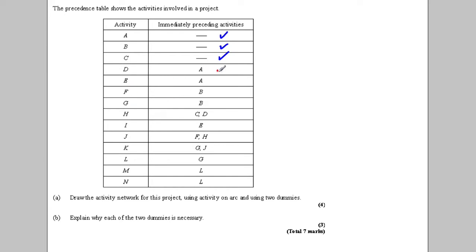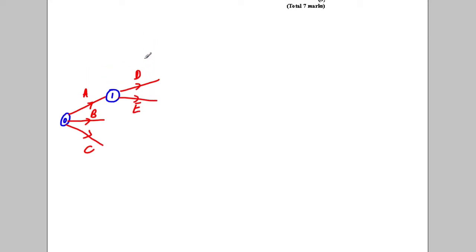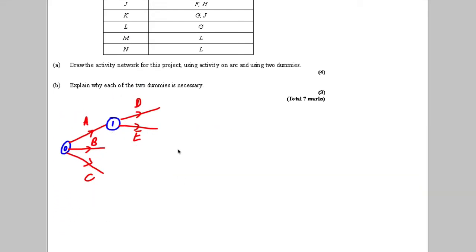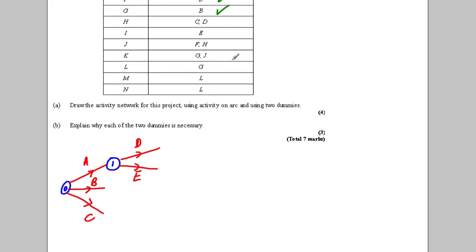D and E depend on A having been finished. So we're going to create the event that A is finished, and I'll have D and E coming out of that. Now F and G depend on B having finished. So we create an event for B having finished — node two — and we have F and G coming out of that.